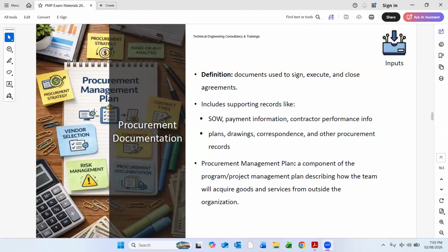If it is approved, then you proceed with finalizing and signing the contract or finalizing the LPOs with them. This is how you subcontract your work. This is all part of procurement documentation, where you are requiring services or goods, the materials, from outside the organization.